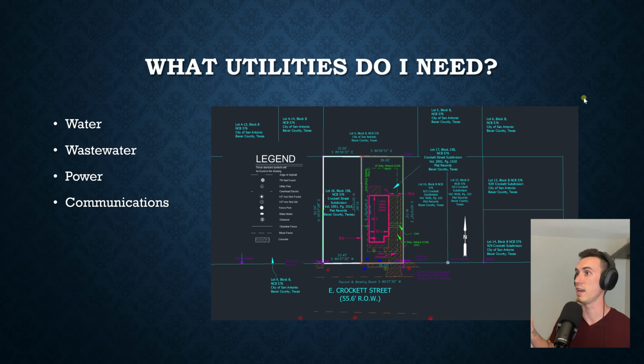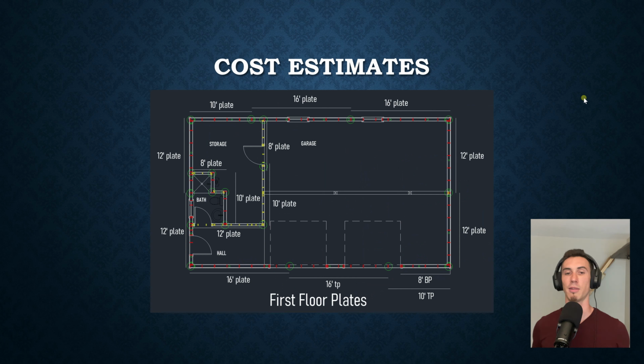For example, if you're sitting on 300 feet of solid rock and the only way to get water is by drilling, then guess what? You're going to be drilling, and that could make your build not worth doing. So these are things to think about when you're getting land.